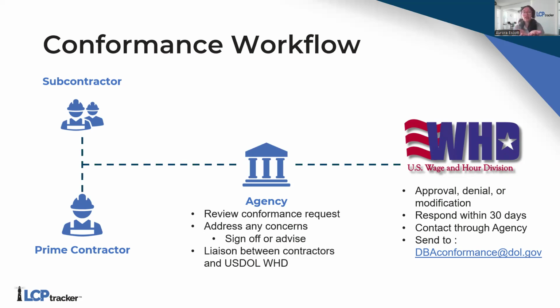We're going to suggest, by suggest, we're saying you're going to pay this missing craft classification this amount of money. Now, the Wage and Hour Division is tasked with responding within 30 days of receiving a conformance request. That doesn't always happen. So just be wary of that.